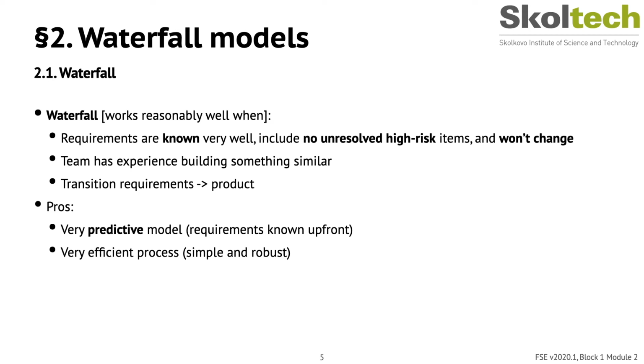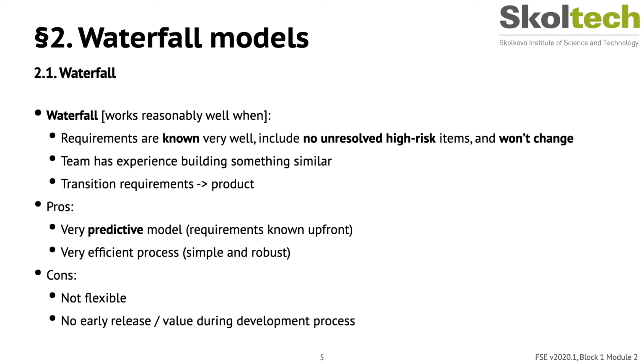You have no loops or feedbacks or things like that. So it's pretty straightforward in this sense. Of course, as a con, it's not super flexible, and it can't afford changing the requirements, and you can't do an early release or get value during the development process from the already running version of the application.